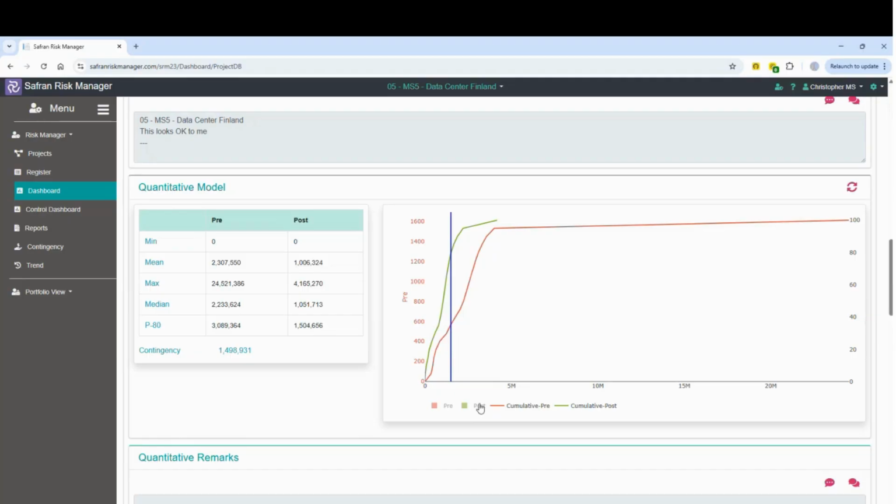So within the module, we have the ability to record a contingency bucket or a budget, and against that budget, we can retire the costs. We can bring costs into the budget, or we can transfer them between other budgets. And that contingency is being represented here by the blue line. Now the blue line is being set at, say, approximately $1.5 million.